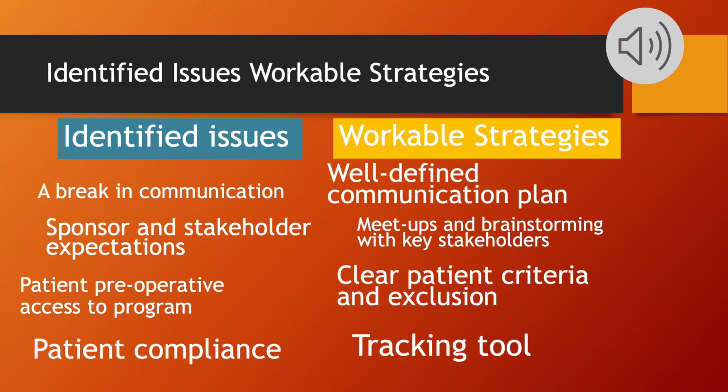Subsequently, issues and errors may arise, and these may not be in the direct control of the project team. We have identified some issues with the respective workable strategies. Identified issues include a break in communication, expectations of the sponsors and the stakeholders, patient access to the program, and patient compliance. Consequently, workable strategies include a well-defined communication plan, ongoing meetups with the key stakeholders, a clear patient inclusion and exclusion criteria, and our tracking tool.